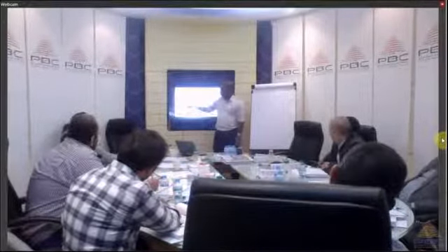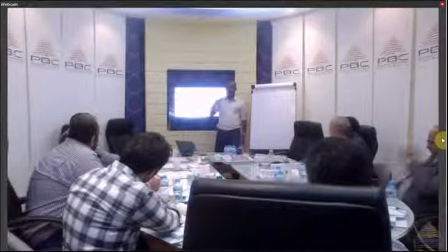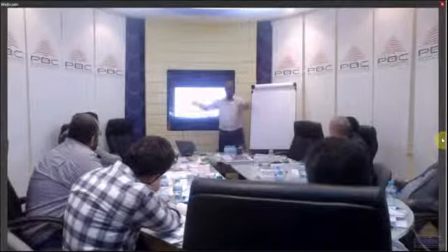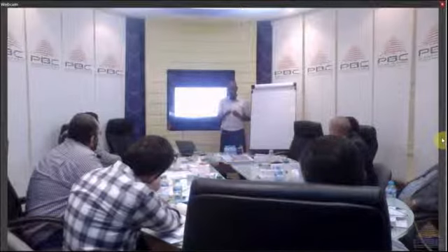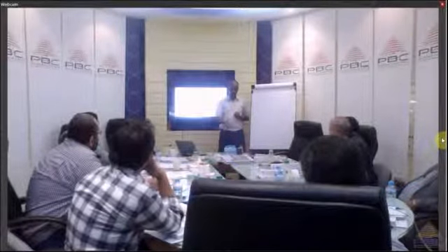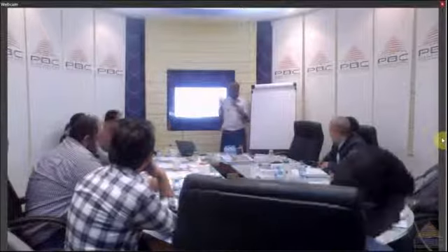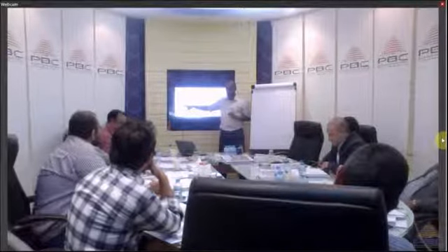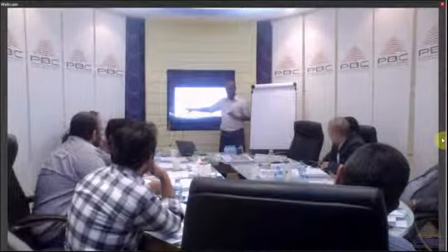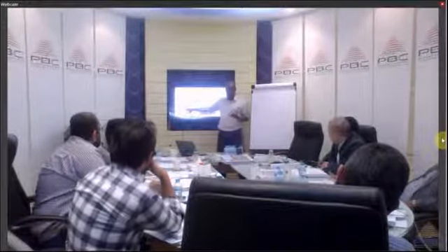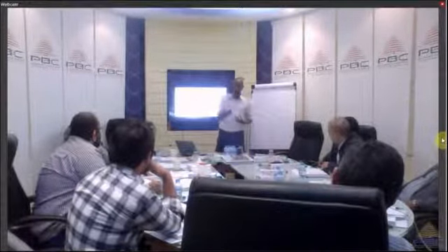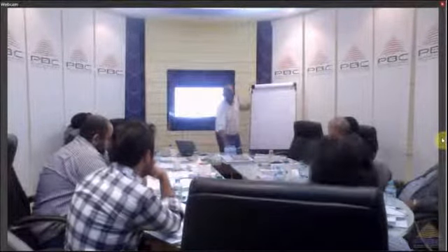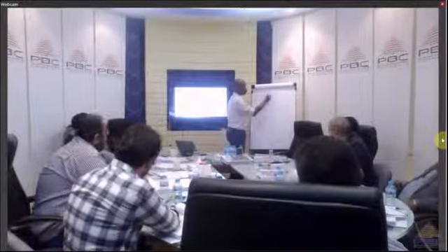Okay? So these are examples of activities, and it's very important that you, if you're a team leader, for example, of a company with many project managers, have some protocols for naming activities. Now, one of the basic protocols is activities should always start with a what? Revise, dig, reserve. Starts with what? The expression of the activity itself should start with a verb. Okay? So this should be common practice.